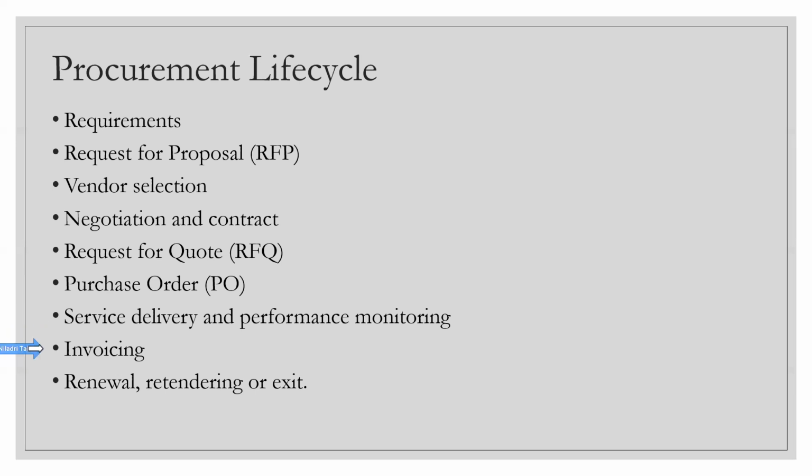Finally, if the product has arrived on your doorstep, then invoicing has to be done. Whatever invoicing you will be doing from the tool, that invoice has to be sent to the vendor or the seller, and the proof has to be there that, okay, we have received this product at our doorstep. Somebody has to vet that. Maybe the local IT has to vet whether the product has really reached the Amazon doorstep.